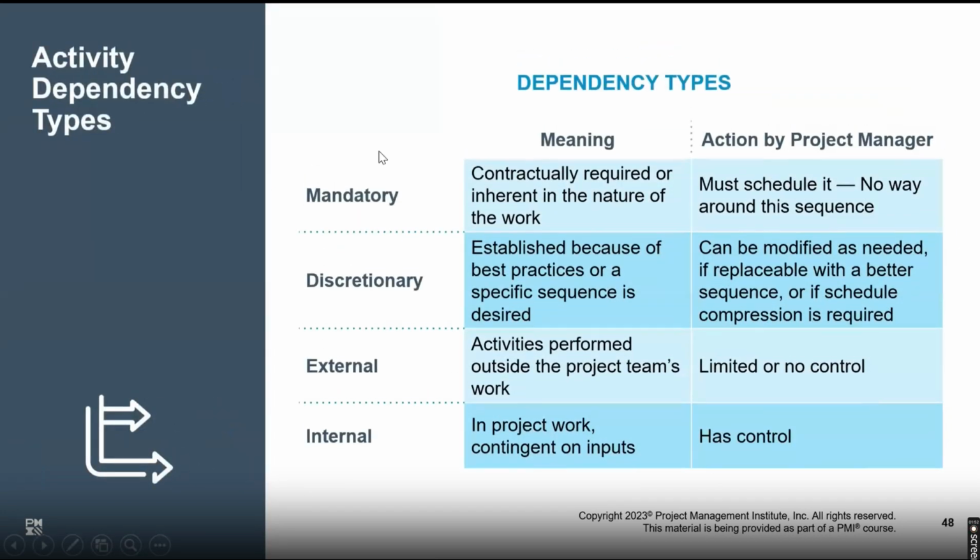Now, these are important ones, and you always get a question on this section. When we are talking about a task to be performed, task A, task B, whatever task has to be performed, there are certain dependencies between the tasks. These are all predictive ones. Mandatory dependencies are the ones which are by nature. You can't do anything about them. Like brickwork will happen first.